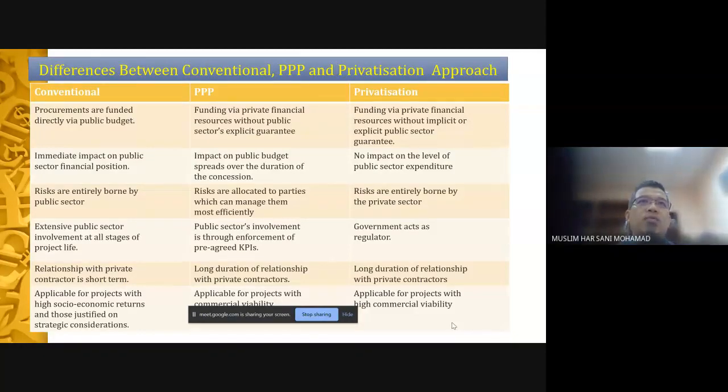Once it's handed over, the ownership to operate and to maintain is basically in the hands of government. Of course, there is a grace period of 18 months, or based on the prescribed contracts, where the private contractors still have to make sure that the buildings and facilities are up to the standards. They still have to monitor.